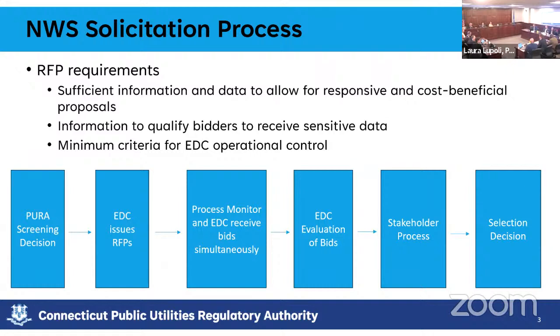I get the appeal for that, but say we have a massive substation trying to defer with a lot, and we put a number out: a $20 million deferral value. The bid could be $6 million, but now they know that they can go up to 20, right? So that's the opposite side of it.